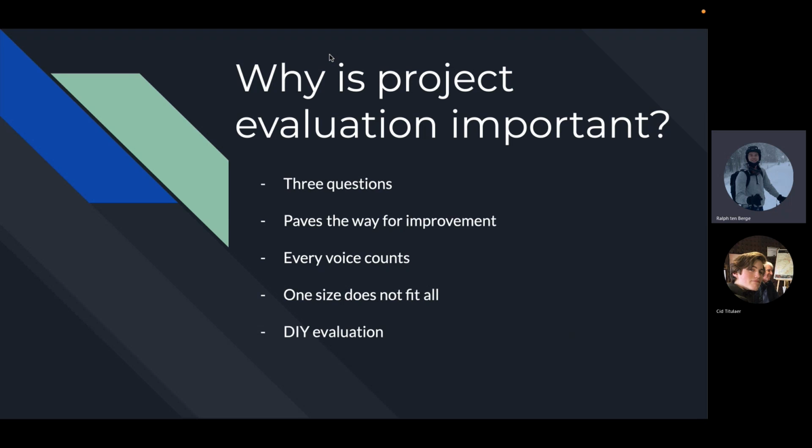And evaluators sometimes ask for written reflections in the form of a narrative or conduct in-depth case studies with select teams. In addition to that, evaluations often include analysis of secondary data, such as written teamwork, progress data submissions, and the extent of online activity. Evaluations frequently include both quantitative and qualitative data. So yeah, to have a more spread out evaluation.